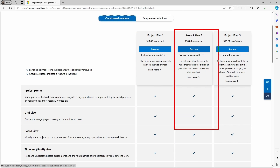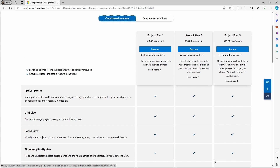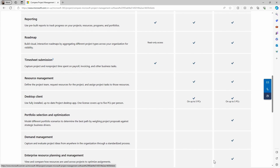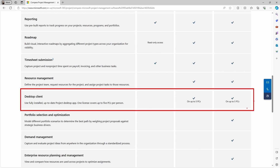Project Plan 3 will give you access to Project for the Web with all the same functionalities, but with the addition of the critical path. Not only do you have access to Project for the Web, but you can also download Project Desktop. If you scroll down to the Desktop Client section, you'll be able to see that Project Desktop only comes with Plan 3 and Plan 5 — it is not included in Plan 1. So if you want the ability to download Project Desktop, you need to start with either Plan 3 or 5.